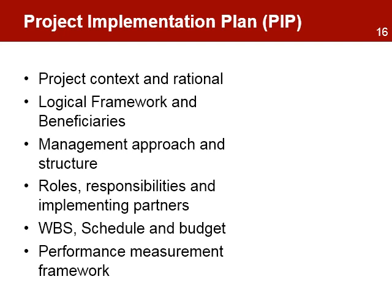In general, the information includes the following elements: the project context and the rationale, the logical framework, beneficiaries, management approach and structure, roles and responsibilities, implementing partners, WBS, schedule and budget, the performance measurement framework, and any other plan that may include cross-cutting themes such as gender and environment that the project will address.